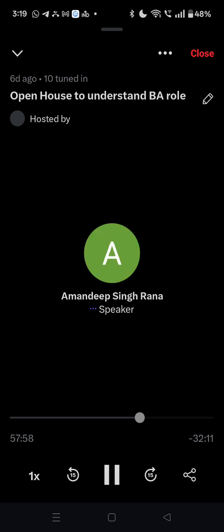So, as a QA, even if you don't know the technical bits, at least you know how small this thing is, right? If you are saying this is just a label change, of course, that's one story point, right? You can't charge 13 story points for one label change. And if someone is saying it's a 13 story point story, you have to challenge that, even if you are not giving story points, right?